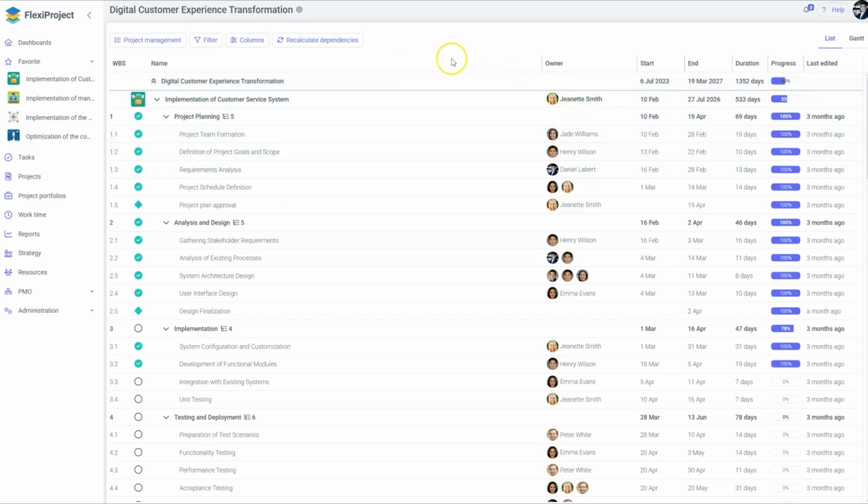It is also important to note that this impact will only concern projects that belong to the same project program. If a project is outside of that program, those dependencies will not be considered, as we are only working on the schedule of the entire program.